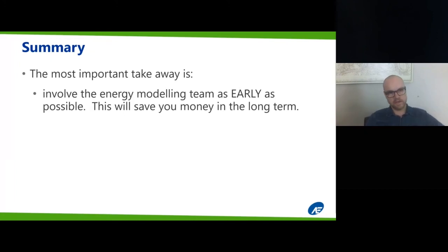And just to expand on that, if you come to us at 90% and ask us to do an energy model, we can do that. But if we come back to you and say you need to increase the R value in your walls, you're going to have big time rework, and I don't think you're going to be very happy as a project manager. So that's my big message. Get us involved early and you shall have success.